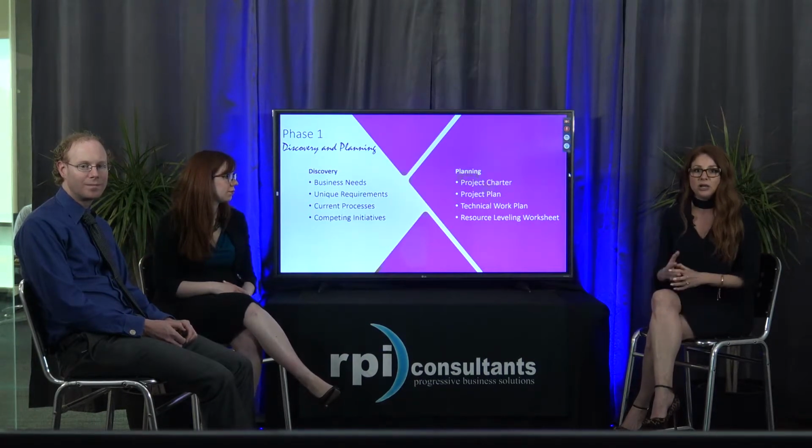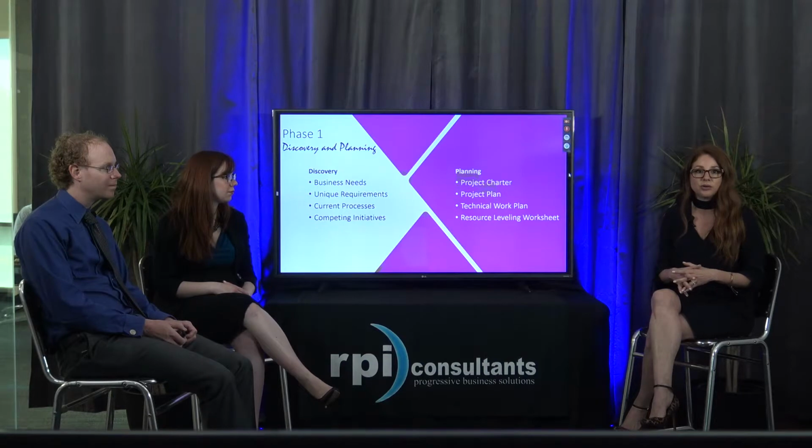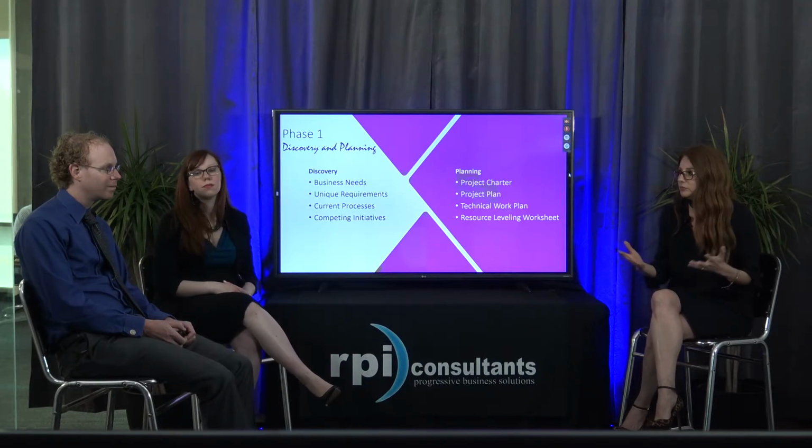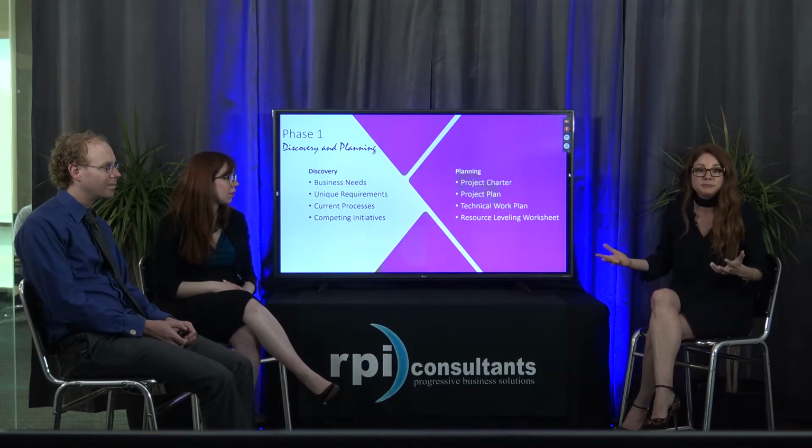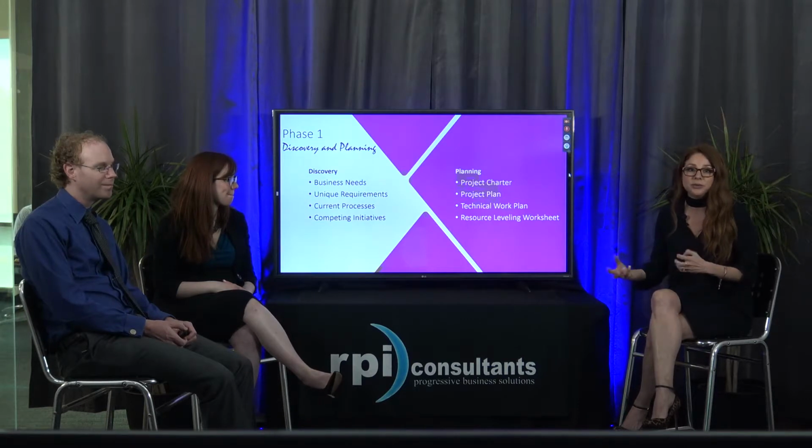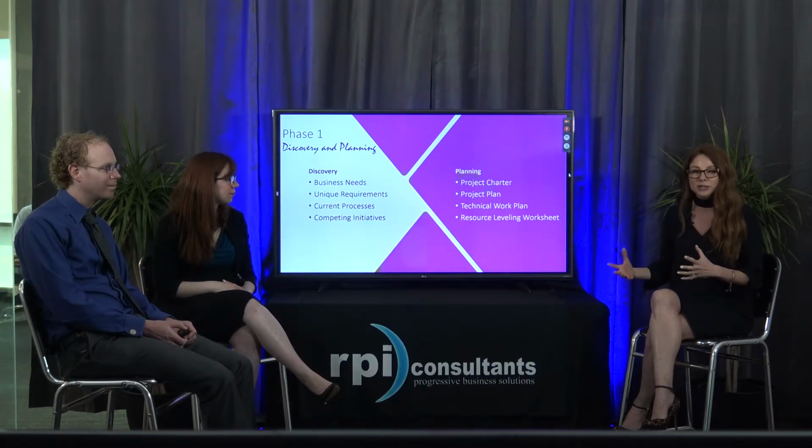You'll go through also some of these competing initiatives. So if HR is out for 2 months because maybe you're updating your scheduling system, I won't name any names, but if you have an upgrade or you're going to a new organizational workforce management system, that takes those same resources that you're using for your GHR project and pulls them to be working and testing on that upgrade or process.